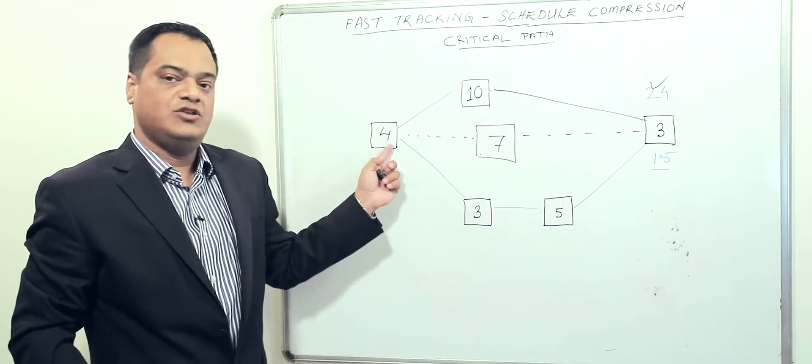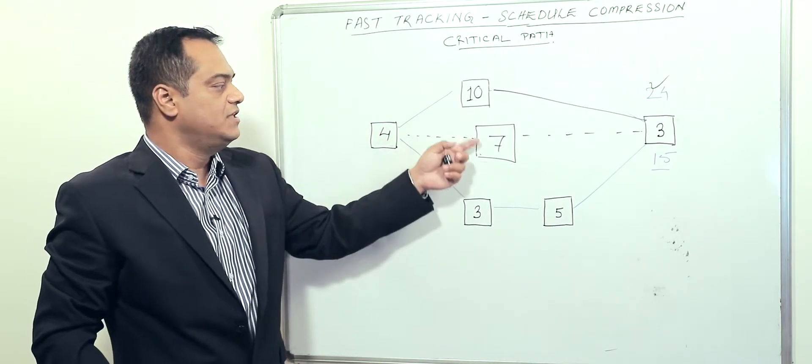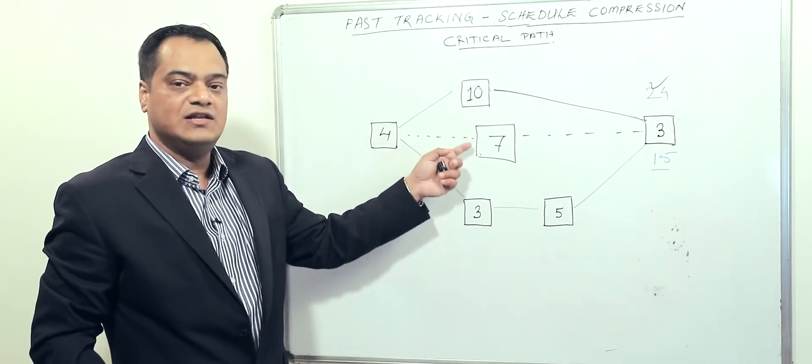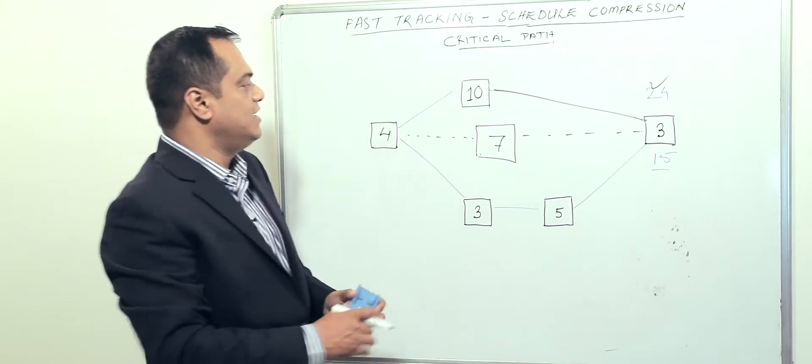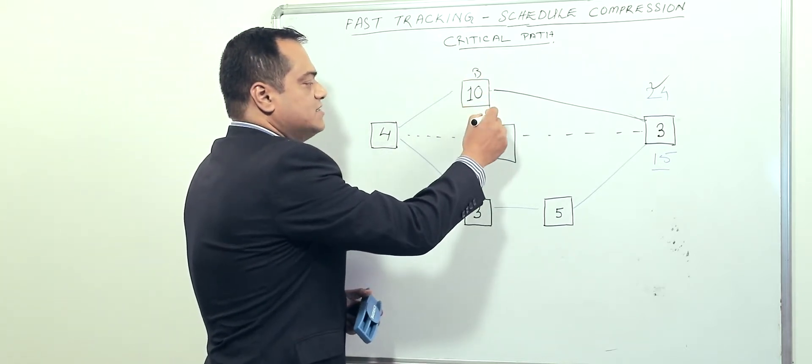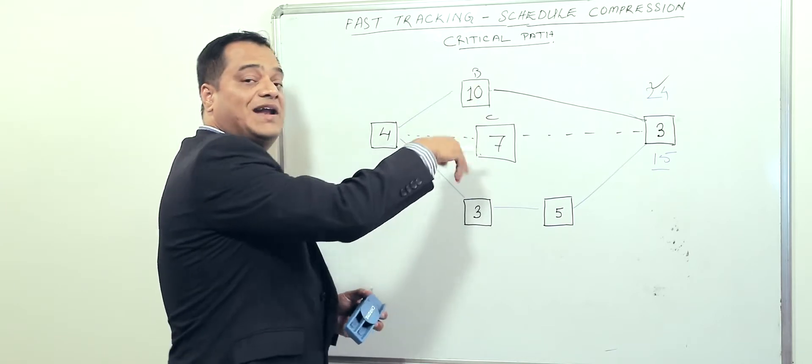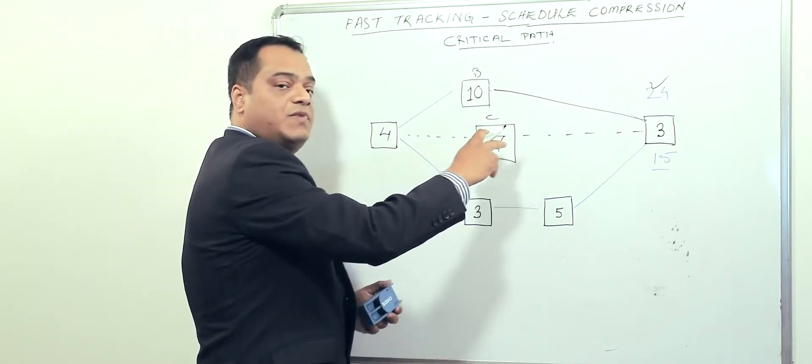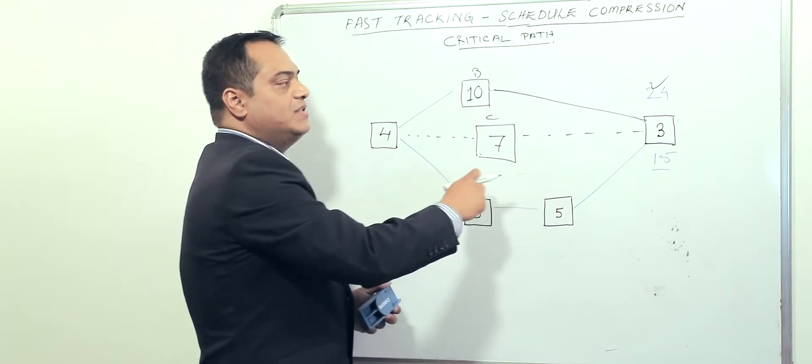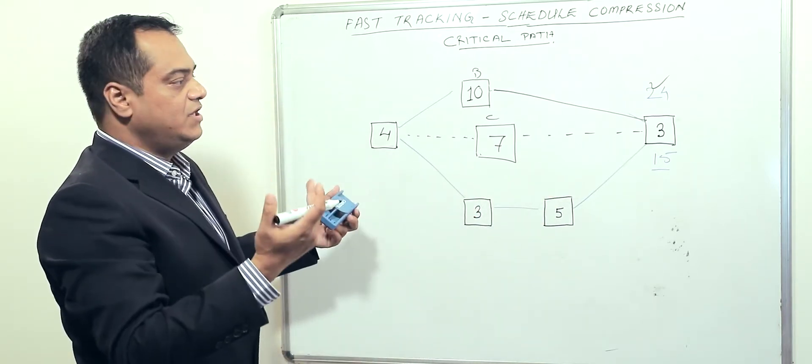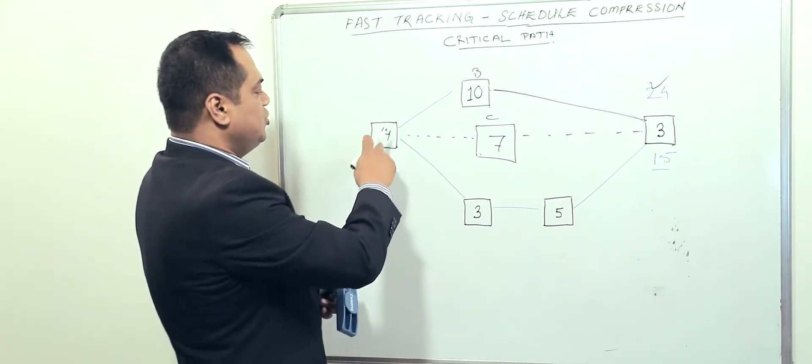We've created one new path because number seven - this path can run in parallel to this. Let's say this is B and this is C, so C can run in parallel to B. We've created a new path. If we recalculate our path...